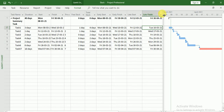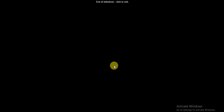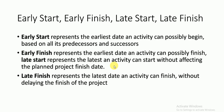So these four dates are important. Let's move into the PPT and I will explain the definitions. Early Start represents the earliest date an activity can possibly begin. Early Finish represents the earliest date an activity can possibly finish. Late Start represents the latest date an activity can start without affecting the planned project finish date. Late Finish represents the latest date an activity can finish without delaying the finish of the project.